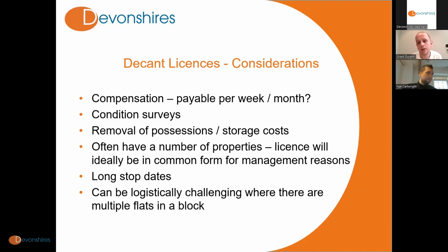On dates, it's worth giving some thought to whether or not work will be done on a phased basis, whether or not you need access to the whole building at any one time, or whether it's, for example, floor by floor, and if so, whether the decant will happen on a phased basis, how much notice you need to give each flat that they need to vacate their property, and what's going to happen in terms of finding their alternative accommodation, whether the landlord is able to do that or whether they're doing it themselves.